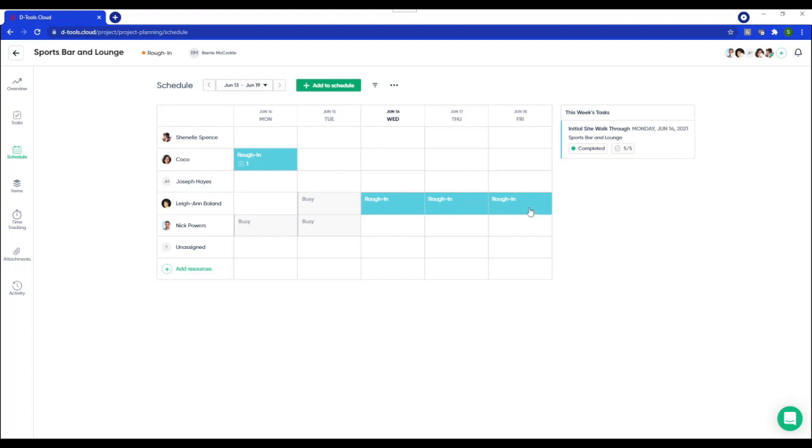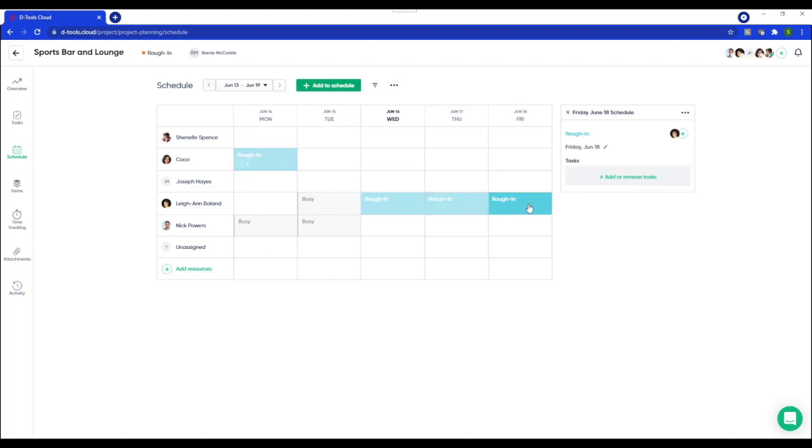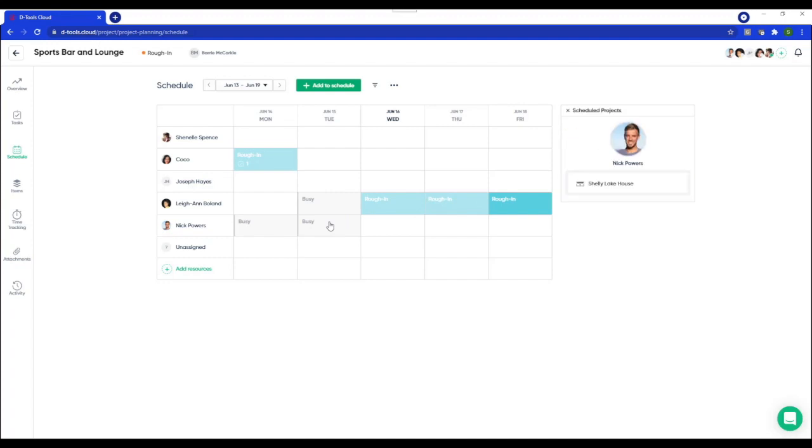So far so good? This workflow is also key because it's important to remember that you schedule people first. Then if you want, you can add tasks from your project plan. Then as we continue to review the schedule, you can also avoid double booking by seeing other project assignments and resource availability, helping you better manage scheduling conflicts.